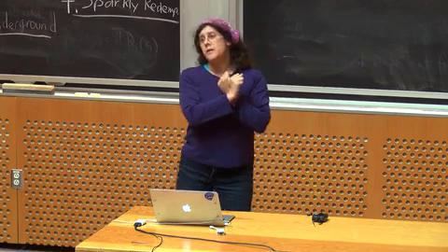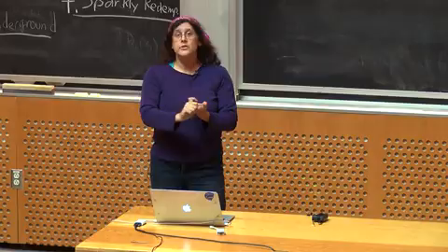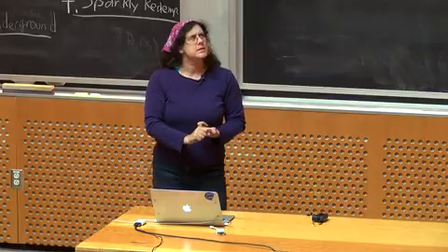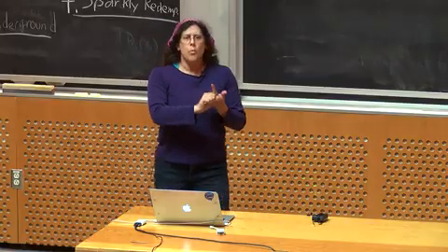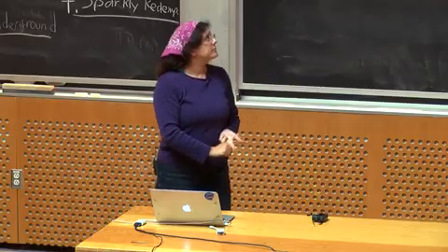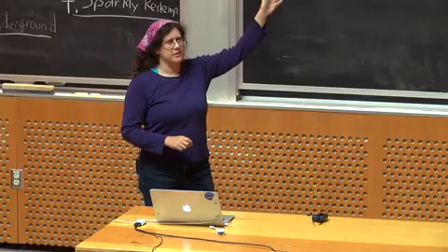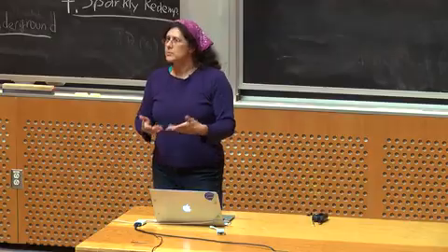What did you do yesterday or since our last meeting? So what have you gotten done? What are you going to do today? What's on your task list? And finally, what is keeping you from getting things done? What's blocking you? How come you can't get things done? Sometimes the answer is nothing, and sometimes the answer is something, in which case it needs to get dealt with.